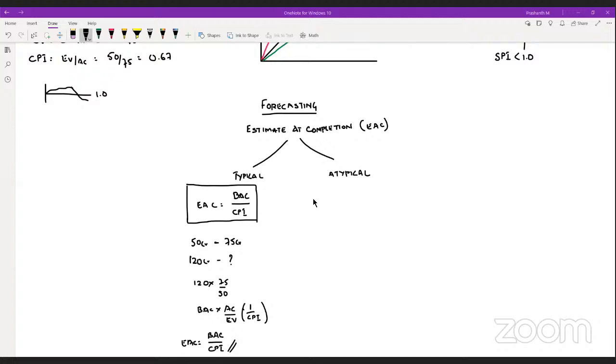Now, the CPI for the future work only is going to be different, not for the work that has already been completed. So it will be the actual cost plus the new formula. Whatever you have spent cannot be brought back. So actual cost plus the work that is remaining to be completed. Why do we need that? Because something has already been done, so we are talking about only what is remaining. So it will be BAC minus AC by new CPI.